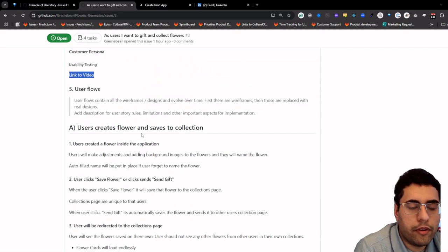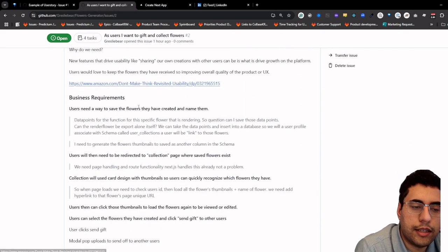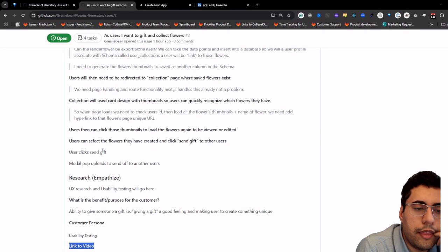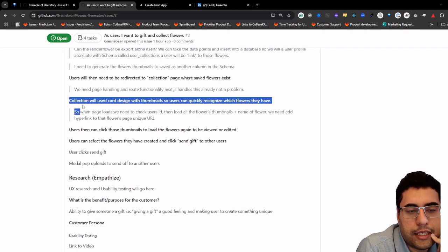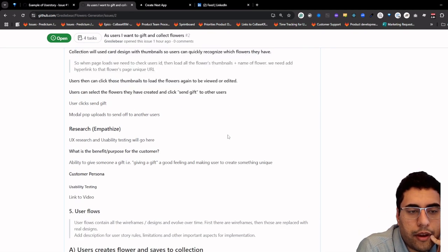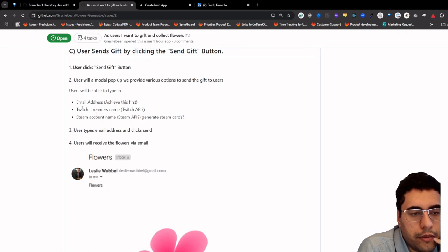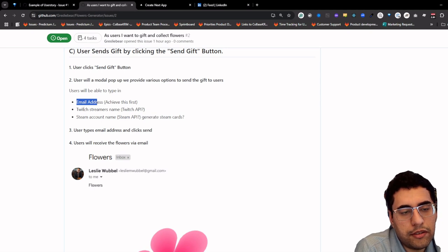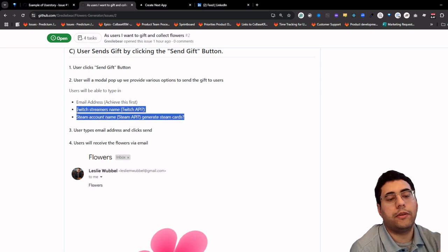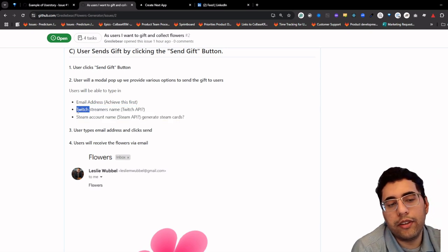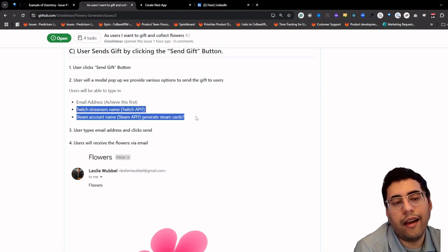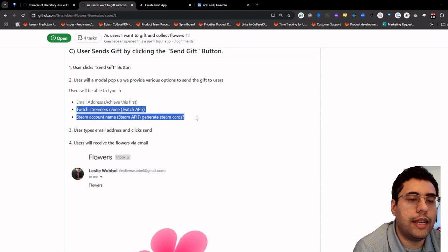So I would review this story with the software manager and say, oh, you know what, this really expands the scope. We might cut out thumbnails, for example. So I would say email address, Twitch streamers, Steam account, and the software engineer will say, the Twitch streamer and Steam account thing, we can look into it, but we shouldn't have it in the user story.